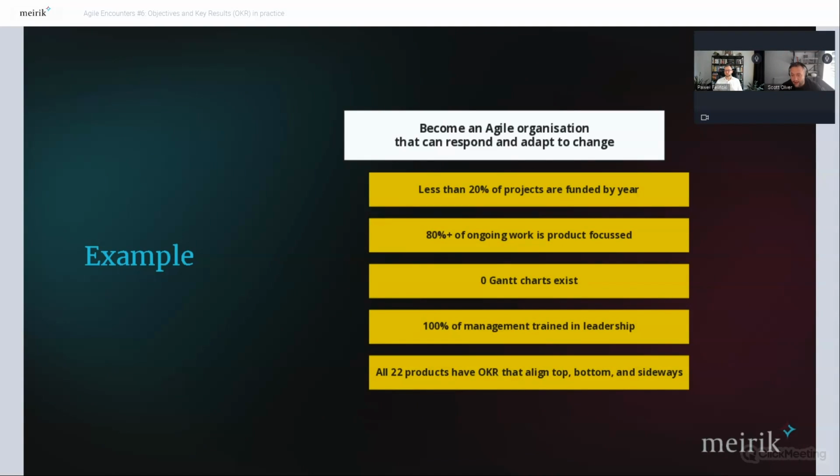If we think about the next level down of that, there's probably a lot of tasks, a lot of things and actions that you can actually do, deliverables that might get us to the 20%, and that's trackable, that's measurable. We can actually measure that. We're at 50%, right? We need to get down to 20% by whatever date. That's really, really good. And the same applies for the rest of them.